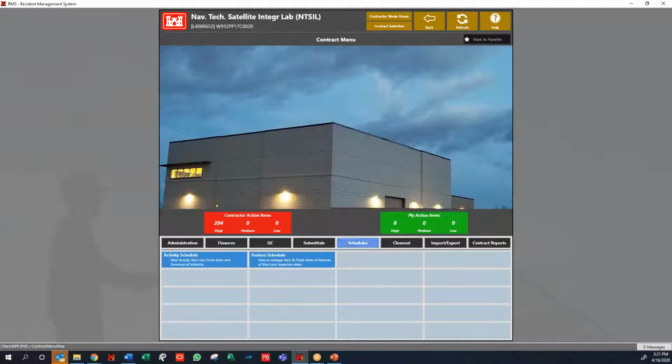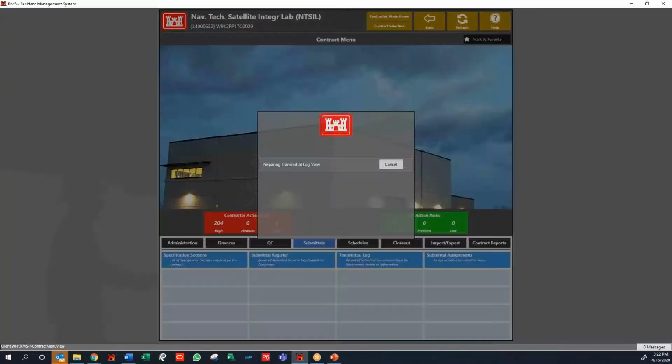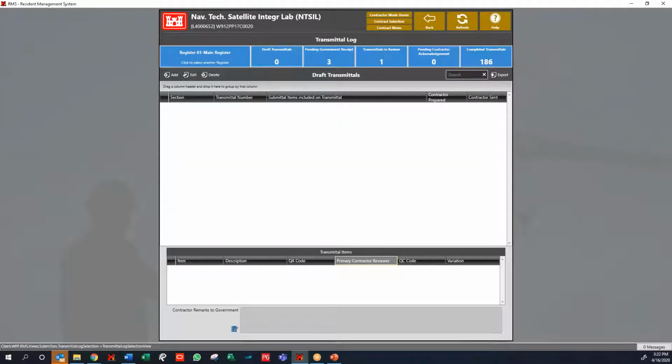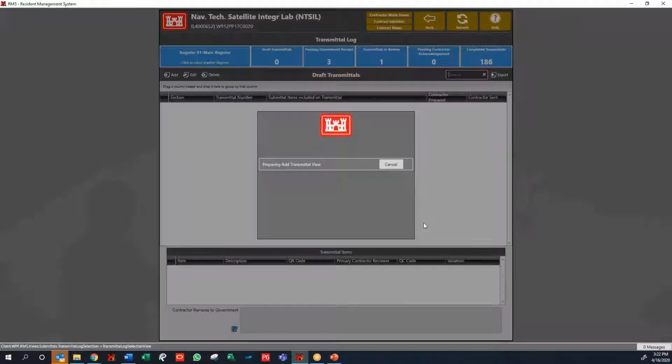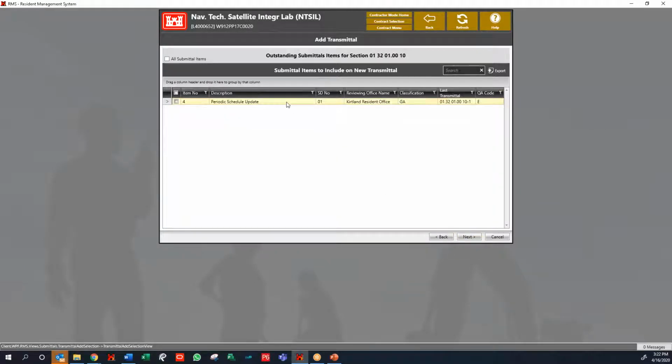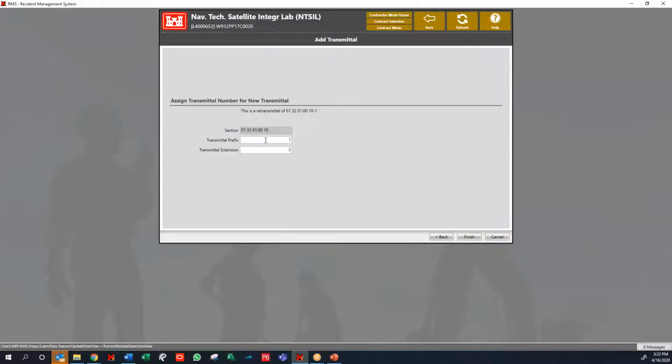So the next question is, you need to submit your schedule elsewhere. Whoops. We're going to go submit that through the transmittal log. So these are where these things happen. We create a draft transmittal. It's going to be 0132 for our schedule. And this is going to be a periodic schedule update because we've already done our initial. This is the submittal section that's in there. And we're going to select that and move on.